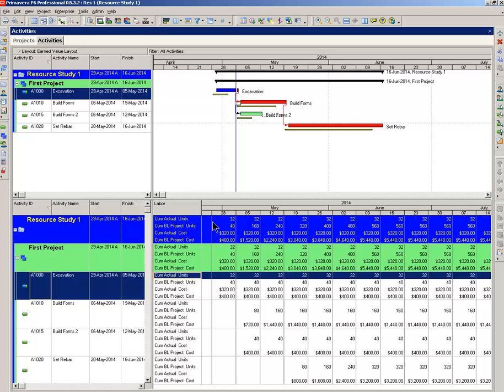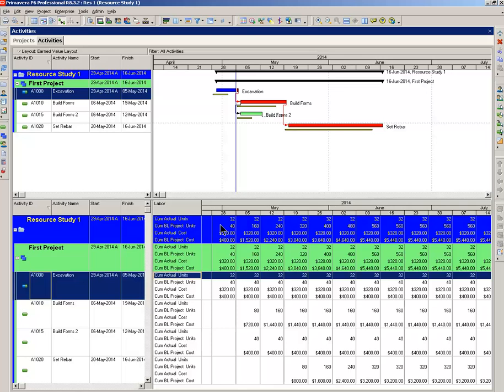Cumulative actual units, 32 for the first week. And that's not going to go up since we've only done one week worth of work. Cumulative baseline project units, 40 for the first week. And this keeps on going up, as you can see. Cumulative actual cost. For the first week, we had one laborer. And we were paying him $10 an hour, hence the $320. The cumulative baseline project cost for the first week was 400. Again, 40 times 10, $400.